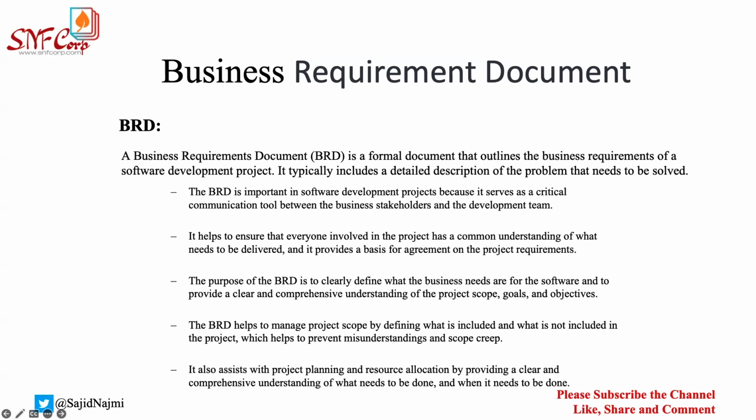Let's say a business has given you something, and now during the project, during the execution phase, business is asking you to add something, right? And business doesn't want to go with that change management process. So what will happen if you accept? This will be called a scope creep.